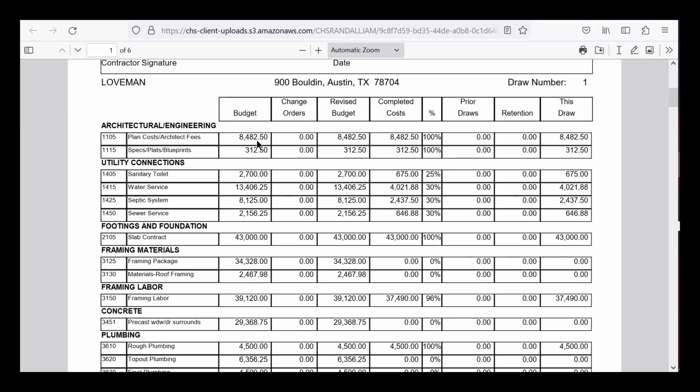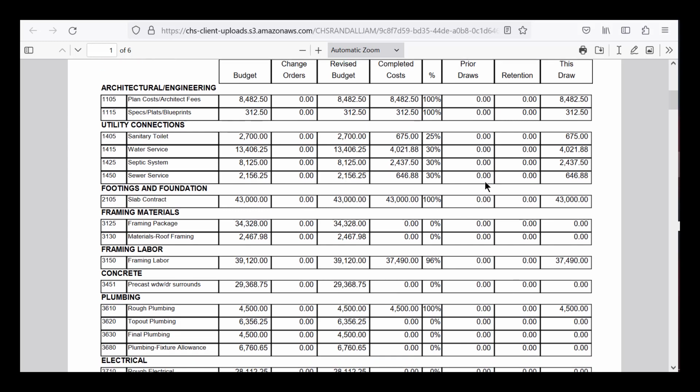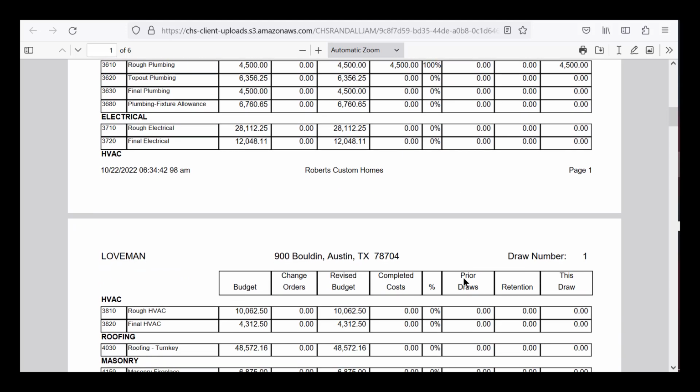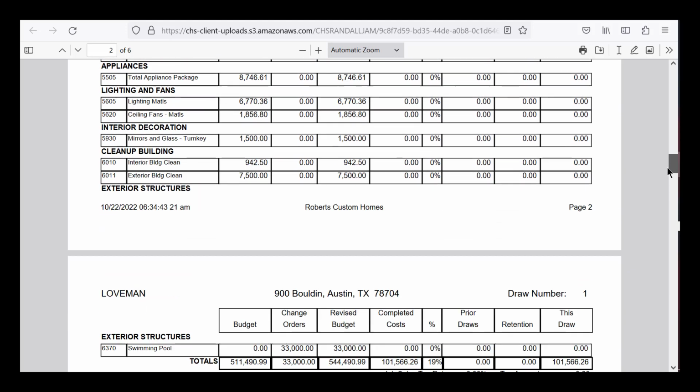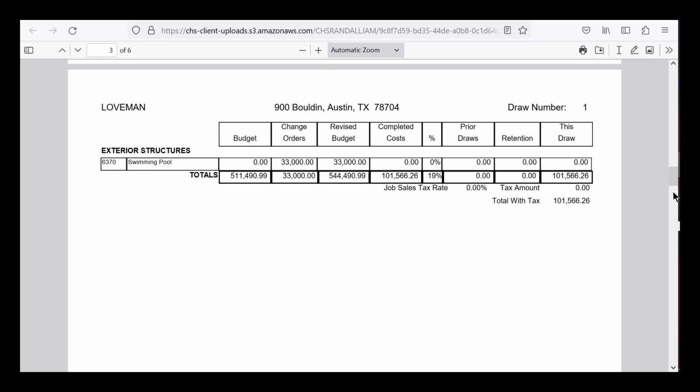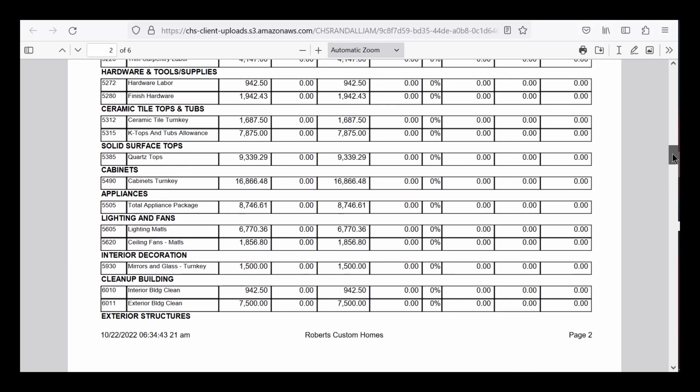You can see going along here is a budget, and it's actually really a marked up budget. And then you're doing percents of the marked up budget that you will enter, or CHS will help you figure out the percents done based on costs posted so far. And then you're including things on the draws, and it's showing you how much percent, and comes down to the end down here to show the total of all your costs and codes. You can print ones that are summaries by just the groups here if you like, etc.